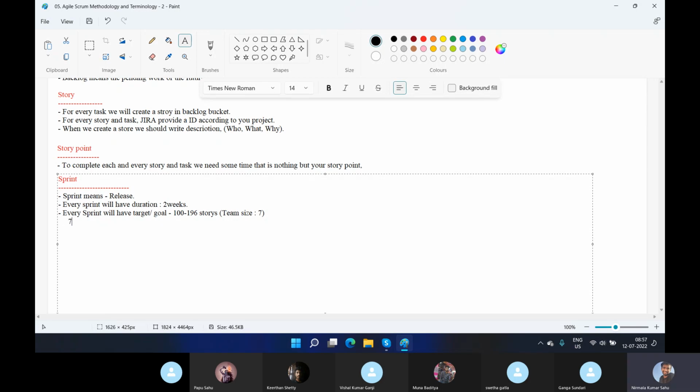We have 7 members, and in 2 weeks just 10 days, so 7 times 10, we have 70 days. Just assume 70 days.